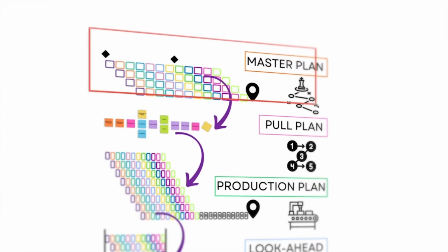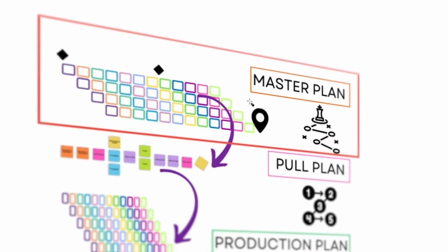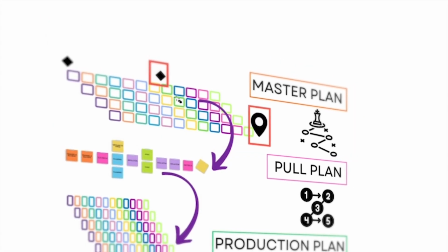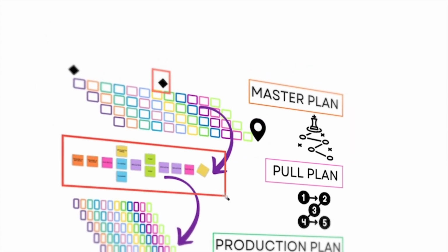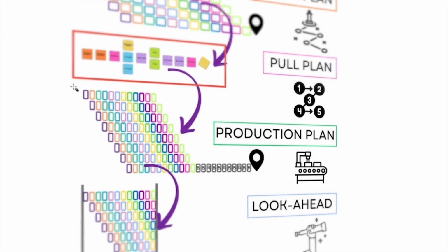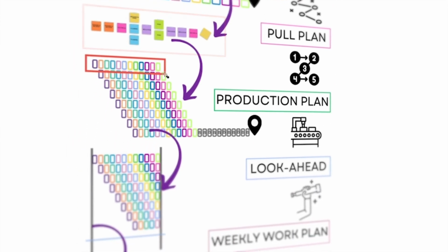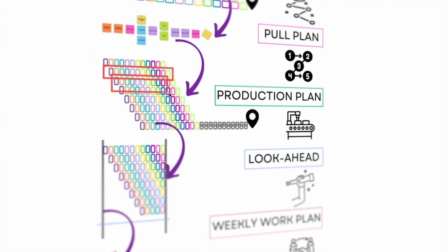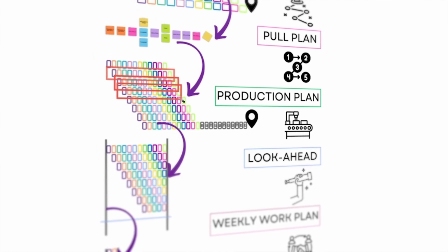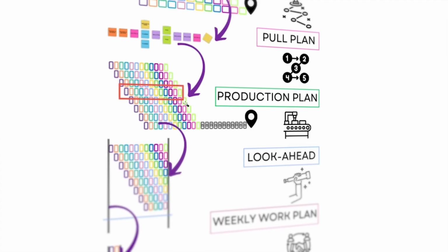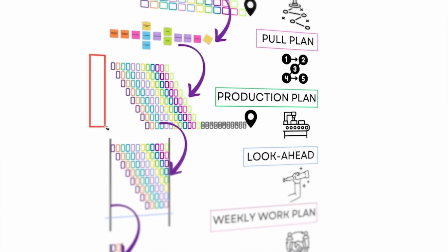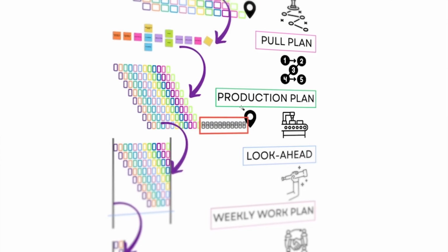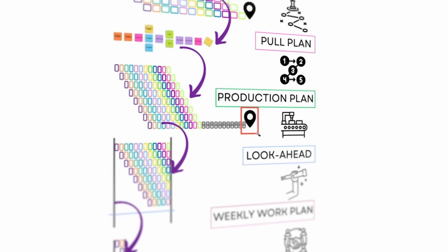So your master plan, which will be your macro level Takt plan, is where you create your contractual promise and your milestones, right? Then, based on the milestone, you'll do a pull plan like I just said. And that pull plan will become one sequence in your overall production plan. And then literally you'll cascade it down to the other ones on a rhythm, make sure that you have good diagonal trade flow and you're jamming. When you do this, you'll also select the right number of zones for that phase, and you'll gain buffers so that you have buffers ahead of your actual contractual promise.